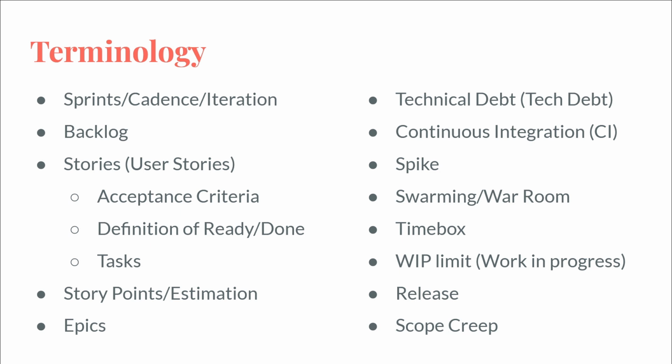But we won't be working solely on the epic. We'll also be working on tech debt and bug fixes and other emergency things that may pop up, or user requests that may pop up. And so we'll probably get about half of those done. So if we get 40 story points and about half of that is going to be on this feature, that's 20. And we have 120 story points to get through. So that will be 6 sprints.